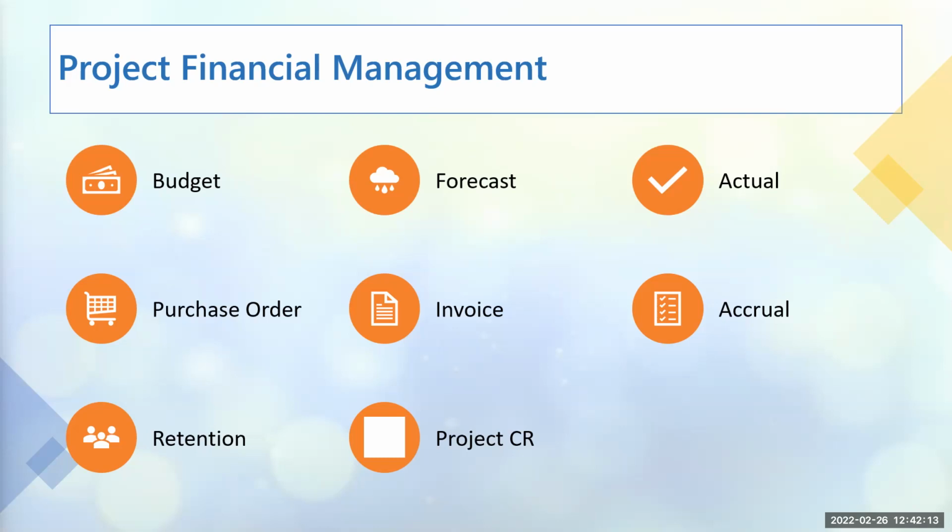So accrual, I would say, is a charge of work that has been done, but it's not yet included in an invoice. This one is very particular from my own understanding, though, as a PMO, is if you haven't got the details of the work that has been done and you need to make claim of it before the month-end process or the financial billing period.